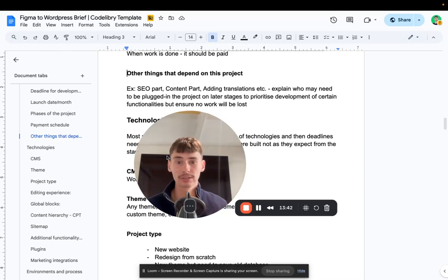I don't know, for free. I personally say that it's not billable work if you specified something in the brief and it was done in a different way. That's why creating this brief is also a good security measure for both sides. If a freelancer or contractor does whatever you say in this brief and then you ask for a different way, they are secured from you as well, because it's extra payment for extra work.